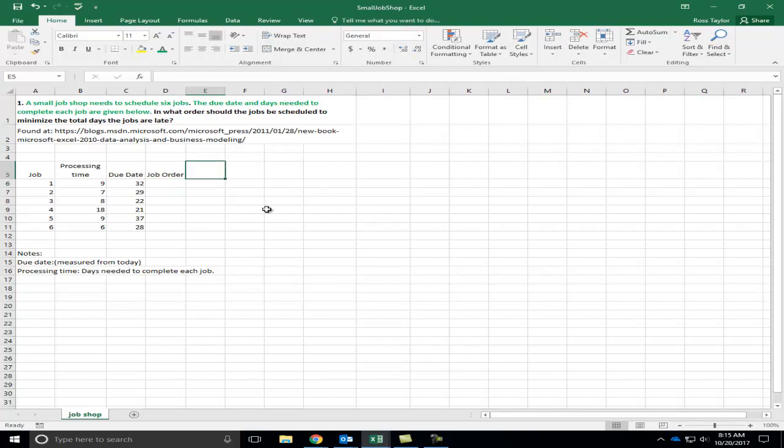For now, I'm just going to put them in the order they're listed. That's not going to be our final answer. That's what we're going to put there. So the total days late. Okay, so I'm going to need days late. To get the total days late, I need to know how late each job is going to be. So days late, and total. My total days late is just the sum of the days each job is late.